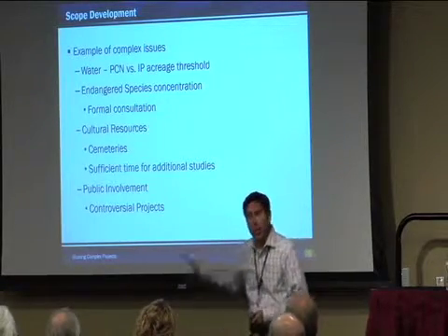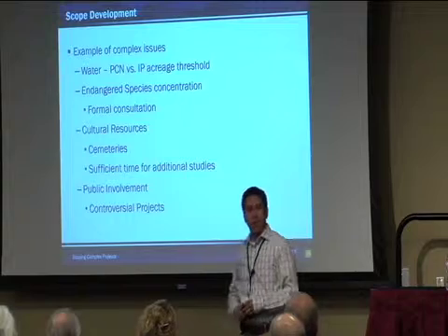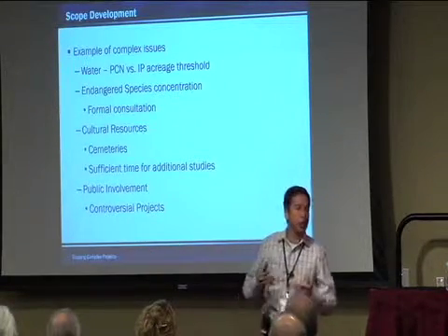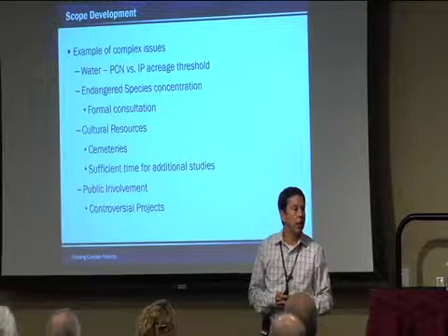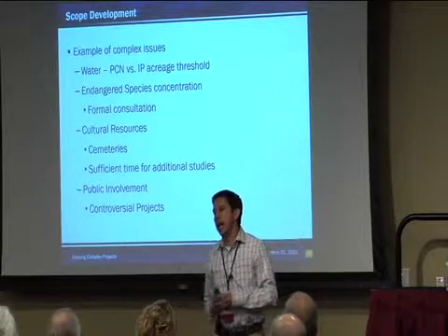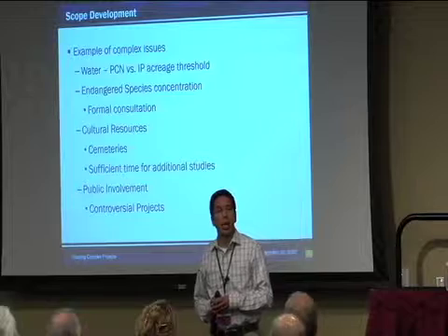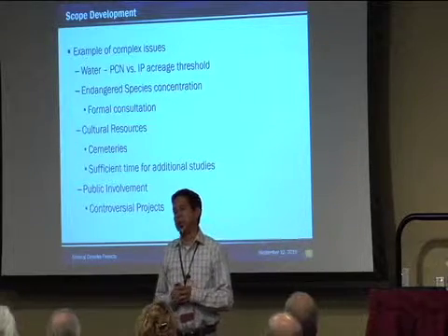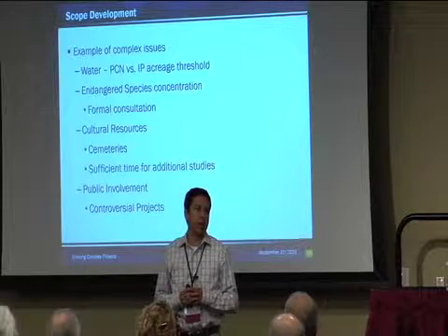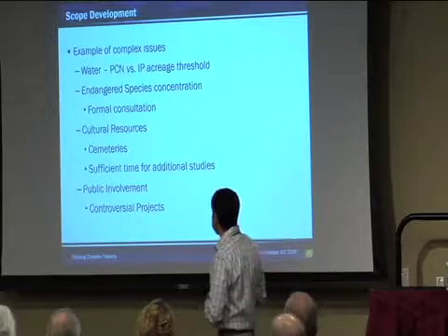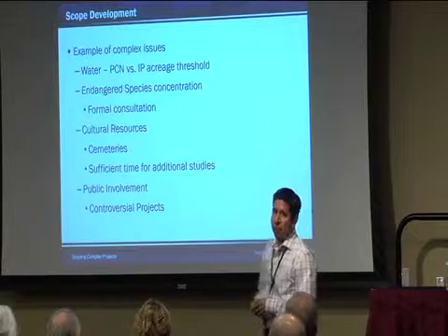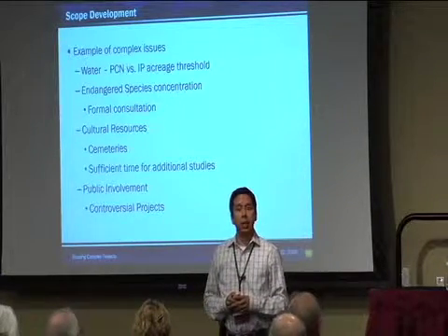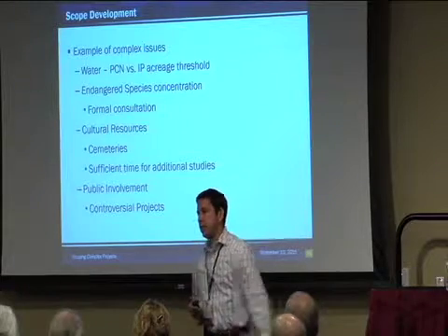It's a probability. Our team, our subject matter experts, as well as some consultants out there, can tell you the likelihood of finding artifacts and anything that can delay your project. So that's one of the things we can discuss early on and maybe get a good guess at what level of investigation you're going to need. And then public involvement, controversial projects. It all comes down to risk, and as was discussed earlier,